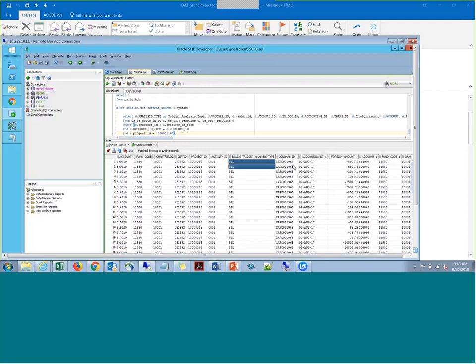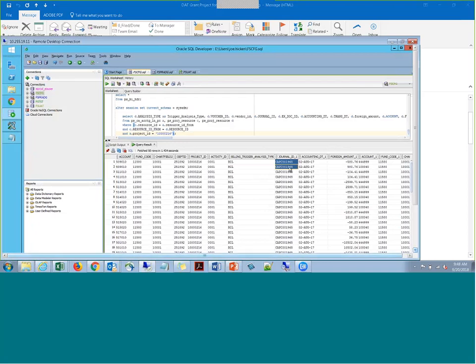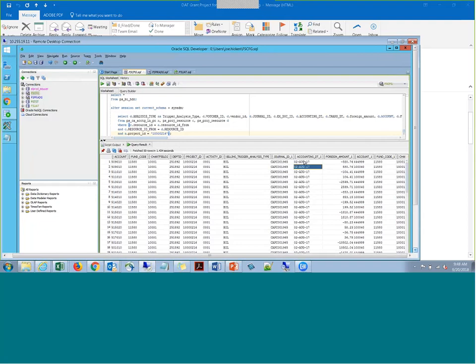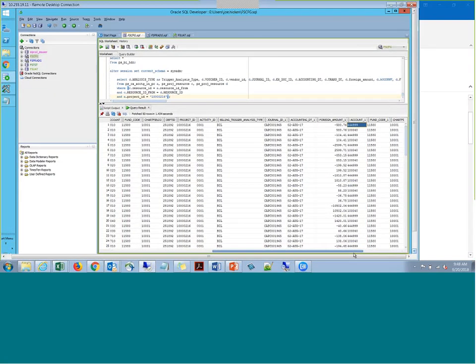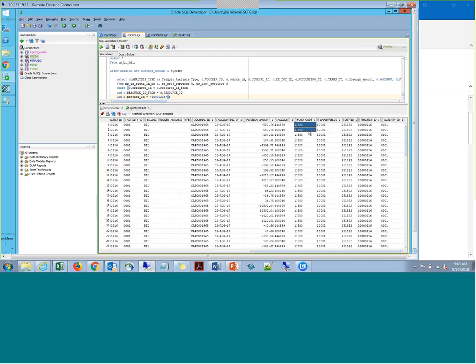These two rows are the BIL analysis types. The journal associated with that analysis type is there, and the accounting date for that journal is here. This is the associated debit and credit, so the debit to unbilled accounts receivable and the credit to the revenue for this particular project. And then the rest of the chart field string for that debit and credit. Notice the only difference is the account, and it inherits everything else from the cost transaction.